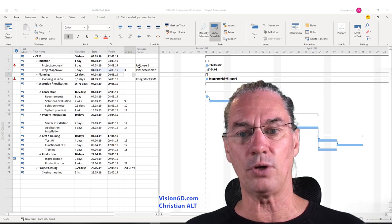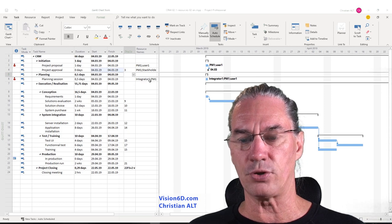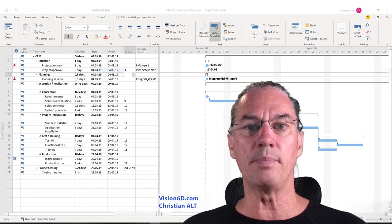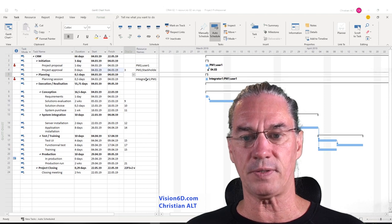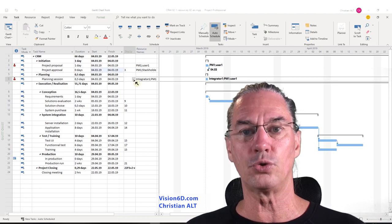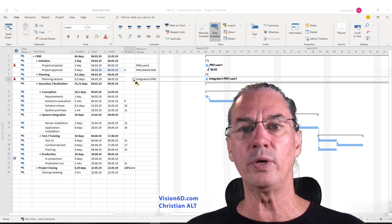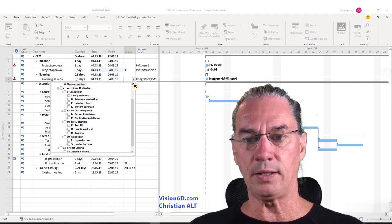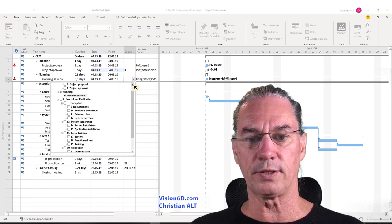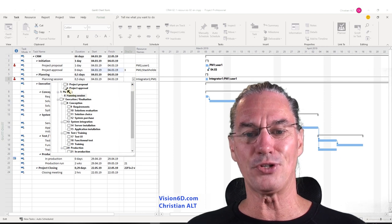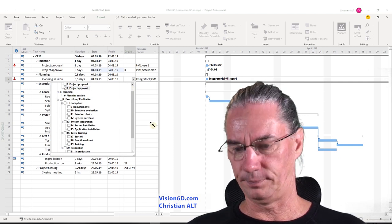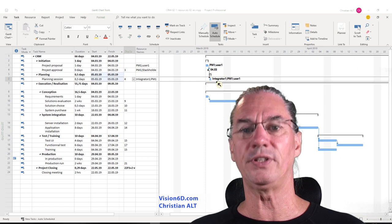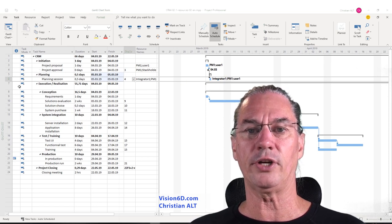We still have the over-allocation because here the planning session also has no relation, no chronology, and MS Project made that task start as soon as possible. So I'm coming back to predecessors and I want to say that we will start the planning once the project approval is here. The predecessor of the planning is the project approval. And we see that the sequences are now one after the other, and immediately the over-allocation disappears.